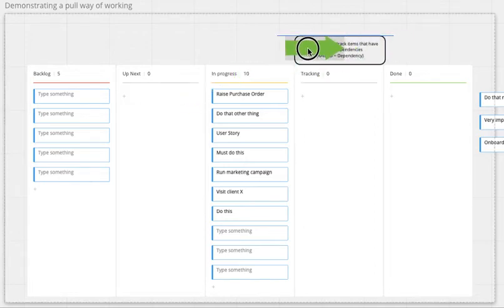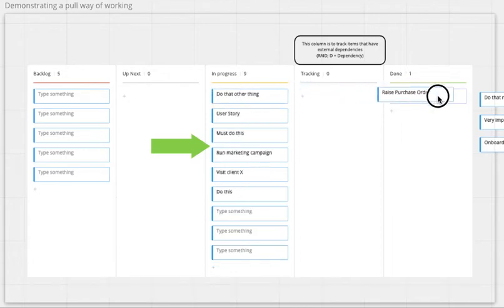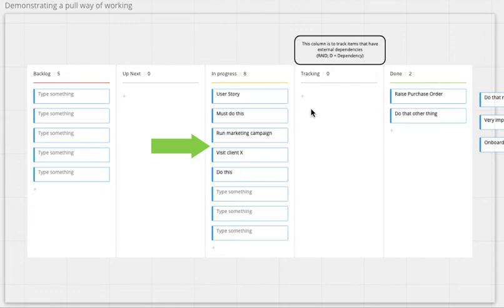So you've stood on the right. You've looked back. You've looked down. Swarm around this. Form a 24-hour plan. So that's now got a plan. Swarm around this. That's got a plan. Keep going until nobody can contribute to anything else. So it's kind of a mini backlog, an intermediate backlog queue. Let's pretend that the team can only do as far as the arrow. And that's it. And over the next day or so, these items are going to move into the done column.